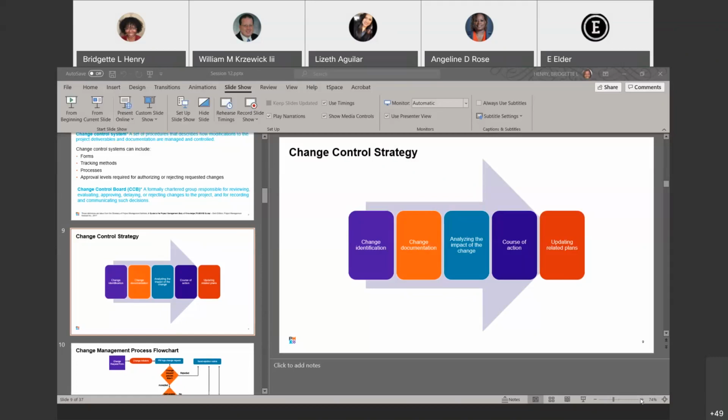Because what if only 50% of your project was going to be done, so you really only needed 50% of the windows and the doors at that point? So maybe it didn't experience a delay at all if they gave it to you half and half, right? Depending on what the true impact of that whole schedule was. Do you see what I mean? Yeah.